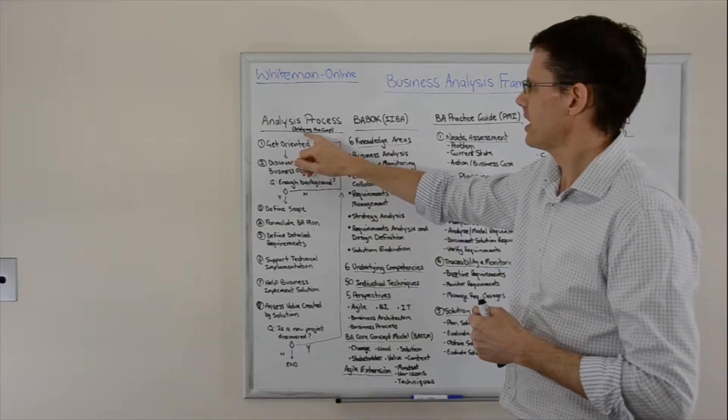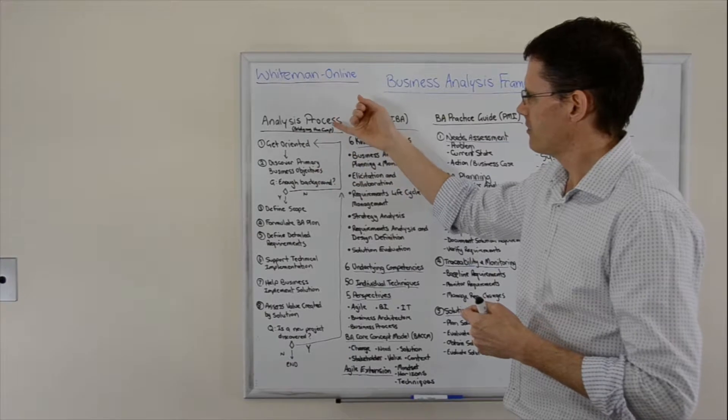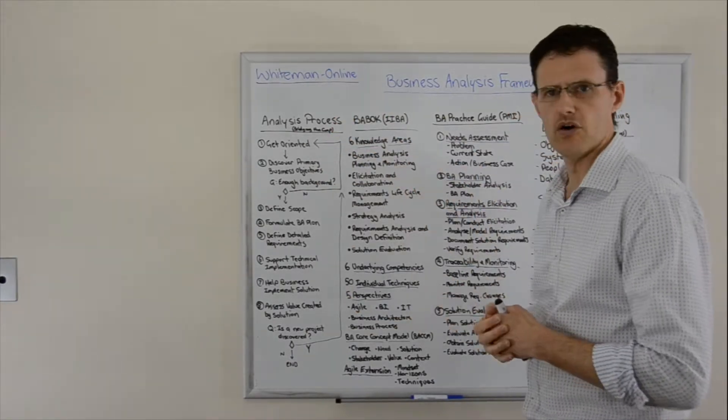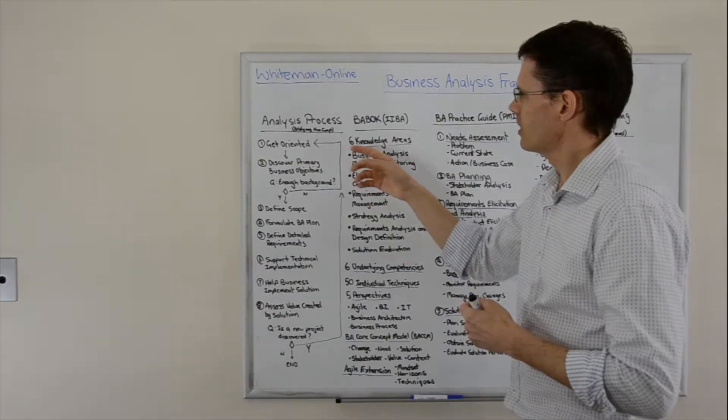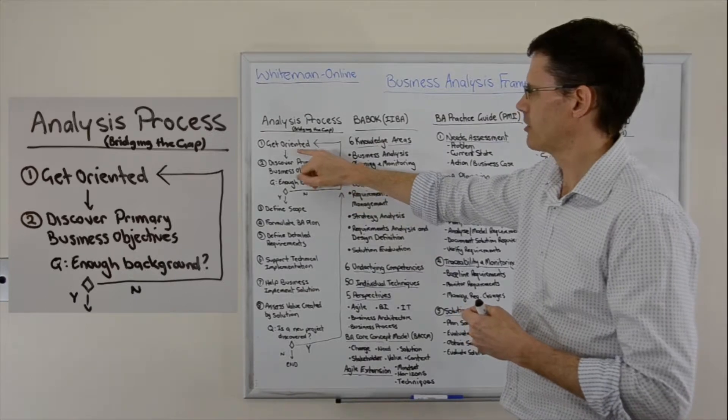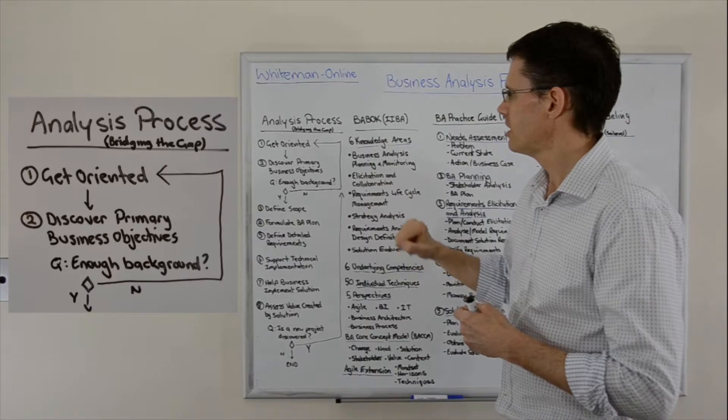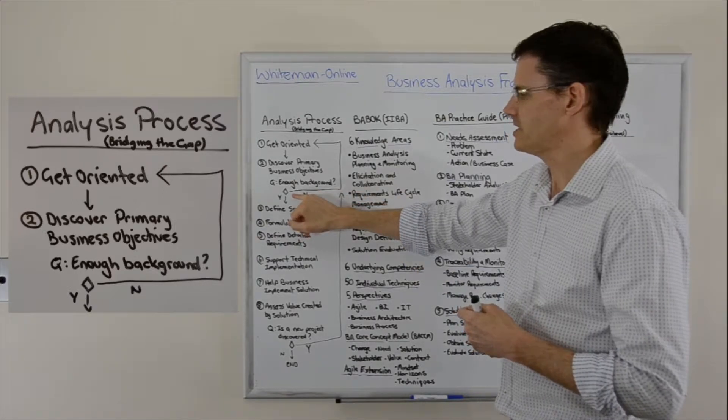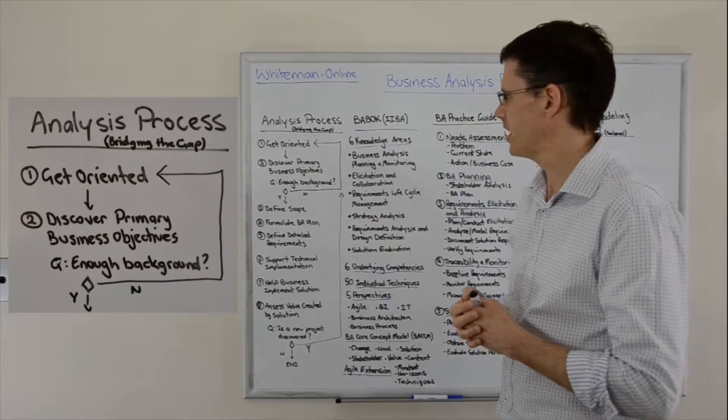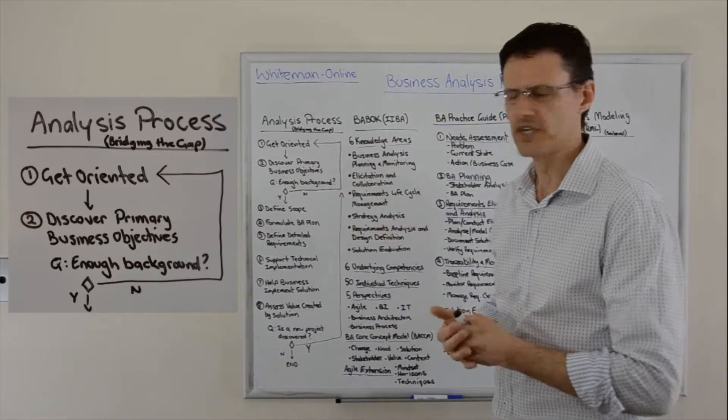We'll start with the analysis process from a company called Bridging the Gap. They define a process rather than a collection of activities. When an analyst first enters an organization, they have a general orientation and discover primary business objectives. They ask: is there enough background to move on with the project and meet the objectives? If not, they cycle through getting oriented and discovering the objectives.